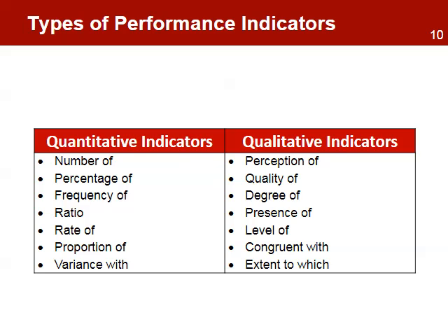Here's a table showing some of the differences between qualitative and quantitative indicators. Note that performance indicators are neutral, meaning that no target is specified. For example, number of communities with a water sanitation committee established versus 10 communities with a water sanitation committee established. The reason for this is that in the performance monitoring framework, a separate column is allotted for targets, whereas indicators are used to measure if there is progress or not. In measuring results, it is important to use both quantitative and qualitative indicators.